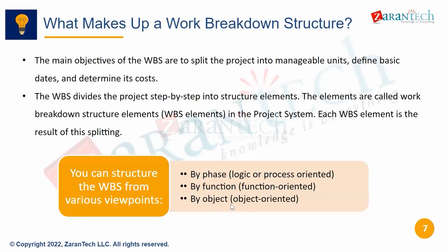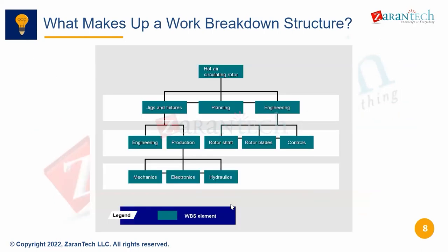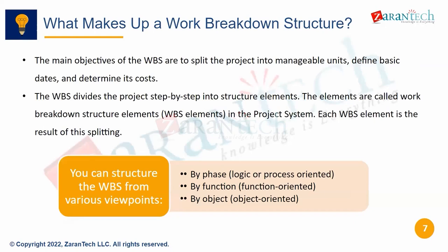See, object is deliverable-oriented. Okay, I can tell you. Let's say I'm making one of these rotor examples. Let's take a simple example of that. Let's say I have a car. So car, I can break it down into chassis. I can make it maybe the steering wheel. I can have the other finishing items. I can have the wheels, tires, seats, and all that. Within that, I can break it down further: the chassis section, what I'll have. So those are all deliverables, or objects, which I have in my project of car.